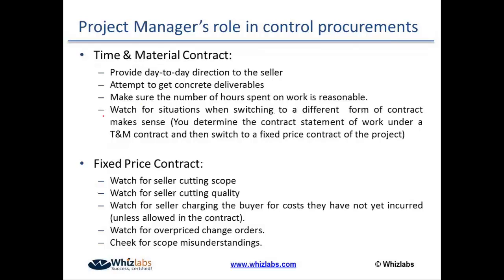If I can control the schedule, then the budget is somehow controlled anyways. Fixed price contract is the first preference for the project manager from the customer side. Only in case I do not have the option to describe the project scope in a detailed way would I go for the other two types of contracts. Otherwise, I would always try to go for a fixed price contract from the customer's point of view. That's the most frequently used contract type.